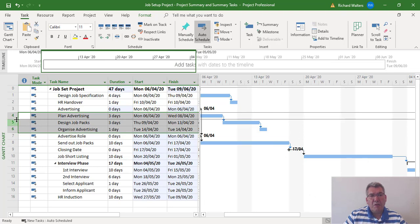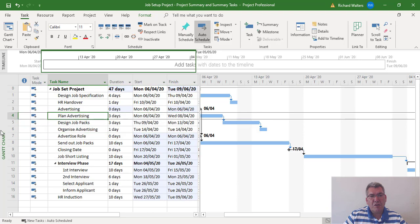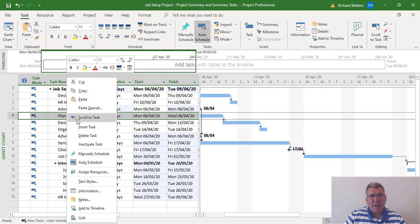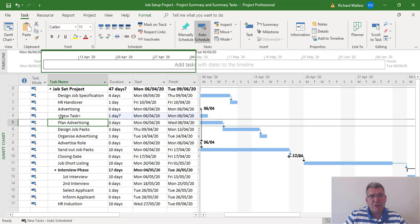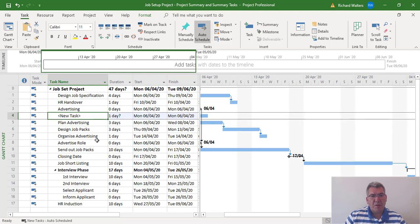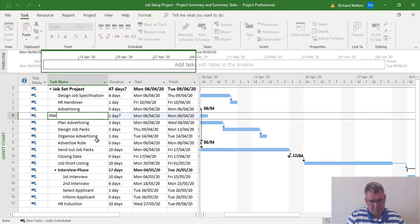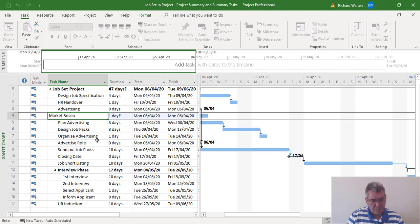Now I'm going to insert the new task which I want in this position here. I can right-click and insert, then I'm going to call it market research, and I want it to be four days.